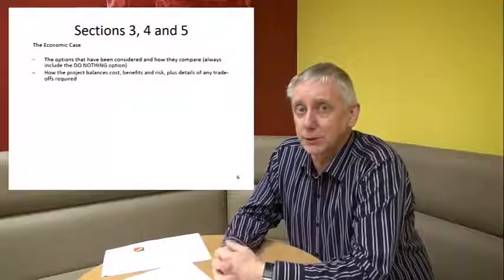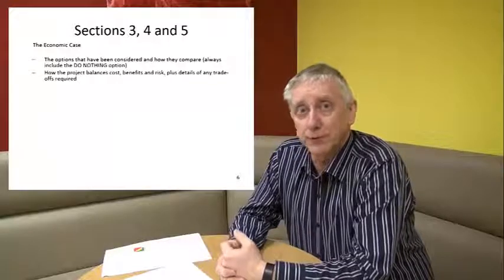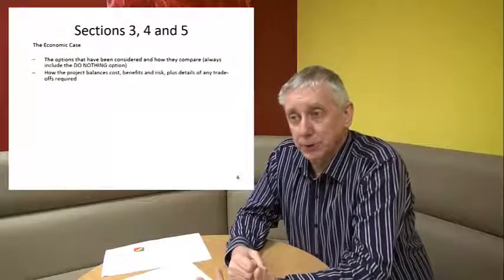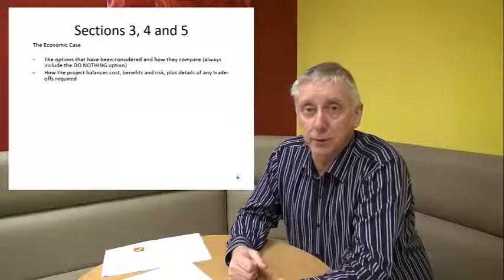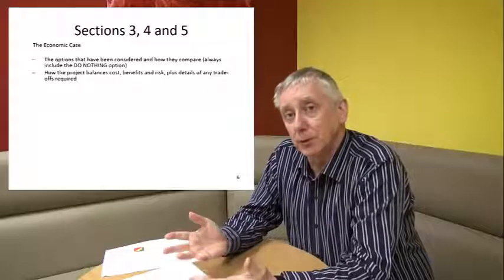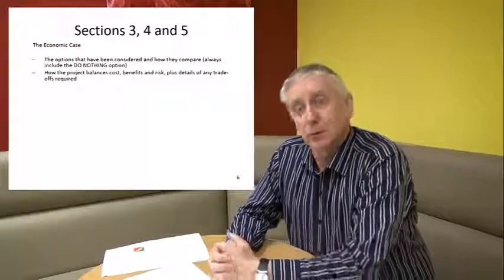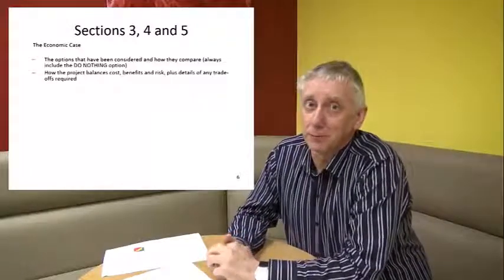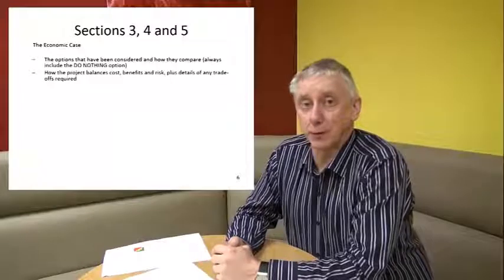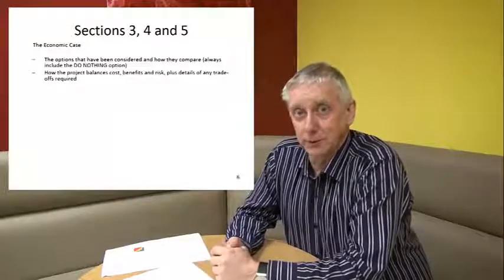But for the moment, you just need to know that the economic case you write has to show how the various options stack up. If you're going to want a proposal which says we need to spend money on 3 locum doctors, well, what other alternatives did you look at? And you need to compare and contrast those options, and that's where the economic case comes in. You also need, and this is regularly forgotten by people who don't do business cases for a living, you need to include what I call the do nothing option. In other words, what would be the implications if we didn't do anything?